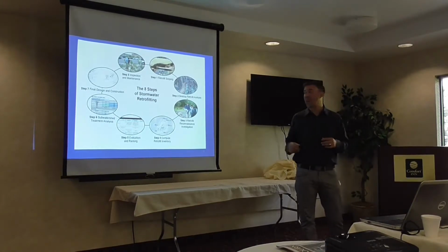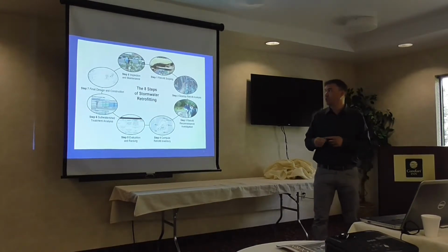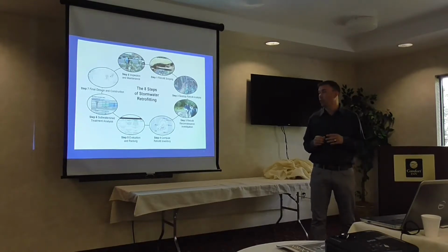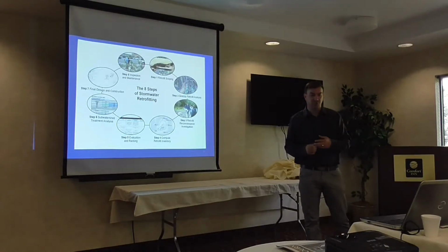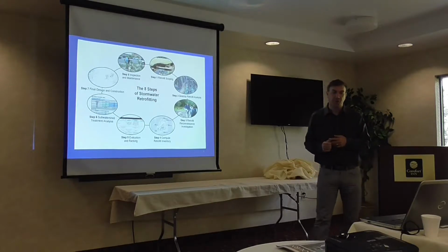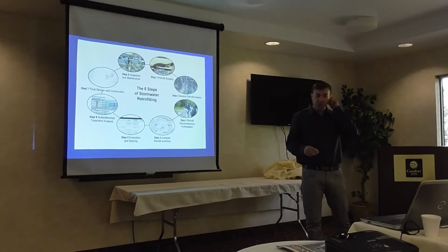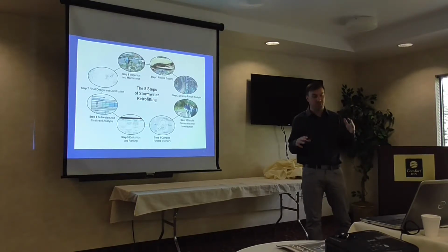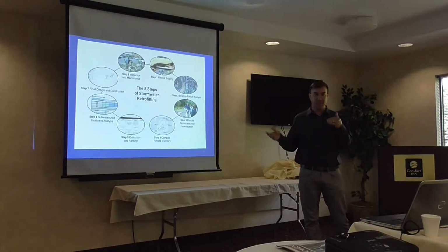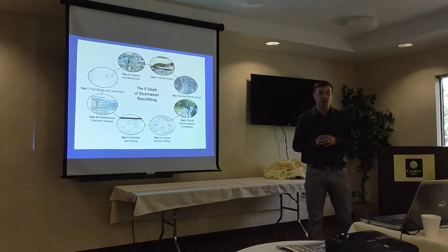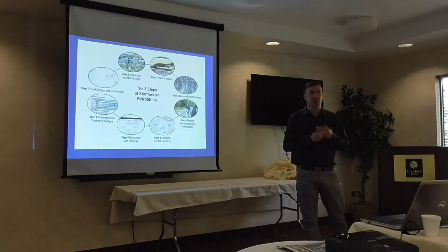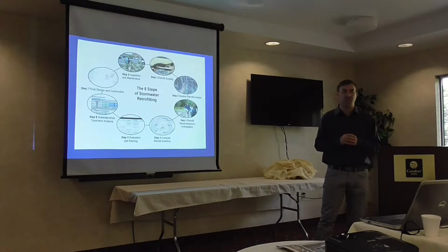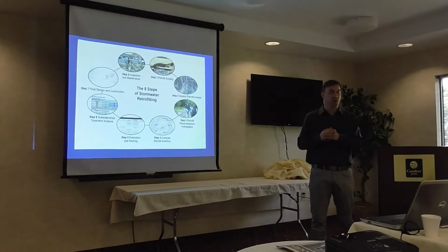So we're going to go through these 8 steps pretty quickly. First one is retrofit scoping, just kind of coming up with some goals. Second part is the desktop analysis, which we just discussed a little bit. The third is getting out there and doing some retrofitting reconnaissance, doing some investigation, driving around, looking at sites. We'll practice this a little bit today. Compiling that information into an inventory, evaluating those against each other and ranking them so you can have a prioritized list of projects that you can implement that hopefully give you the most bang for the buck.